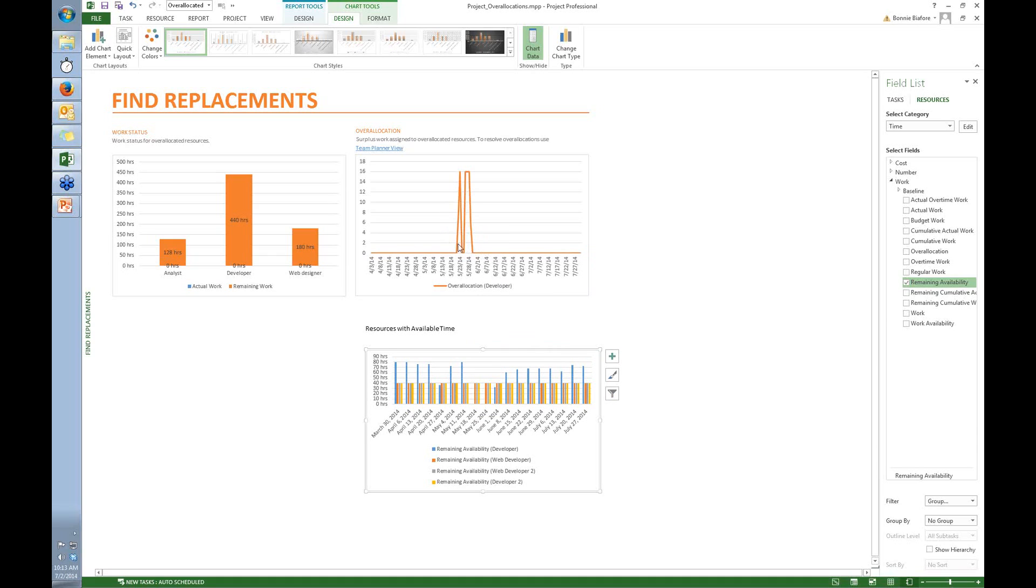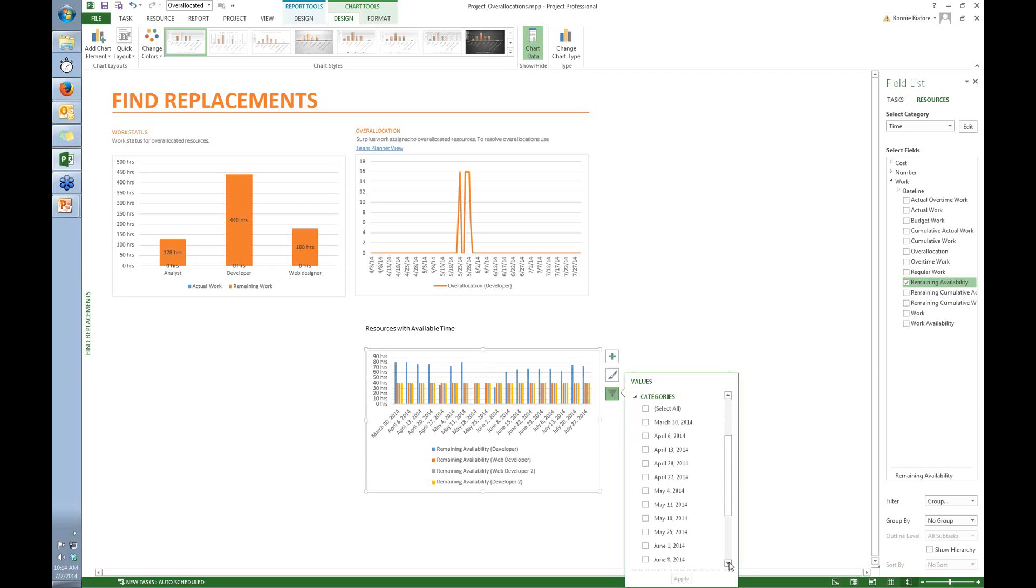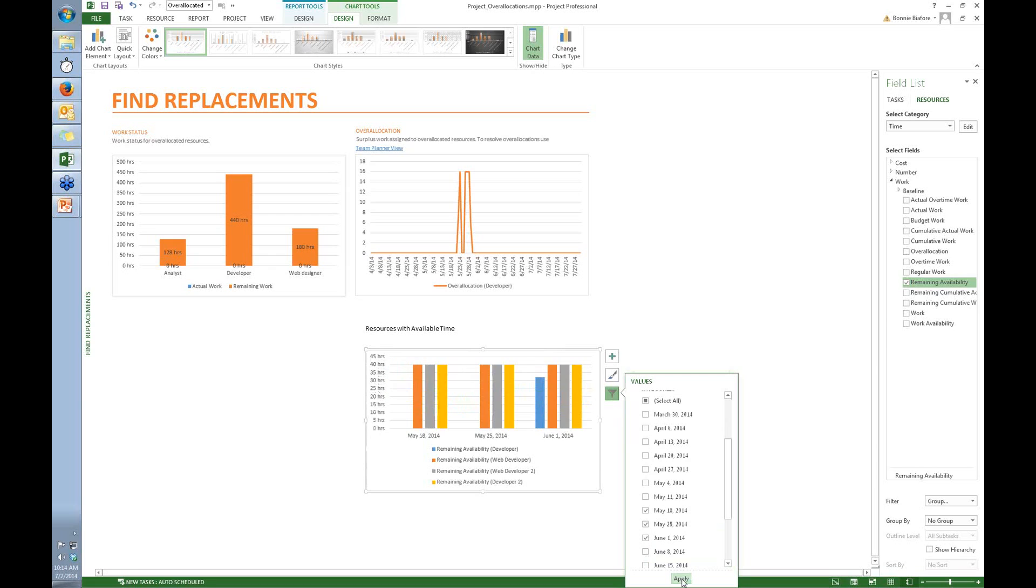But the thing is the developer's only overallocated for a couple of weeks. So there's a really easy way to filter this graph. Once again, just click this filter here. And you can turn off all of the weeks. And then I just want to see the weeks from May 18th to June 2nd. So I come down here and just turn on the weeks that I want.